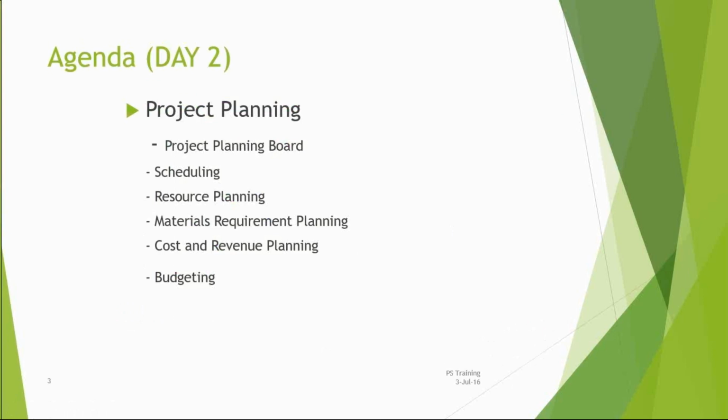Suppose my activity has so much of cost. This activity has 10 material components and it is being linked with three resources of so and so activity type, linked to this particular work center, and they have suppose 500 hours of duration. Then what is the remaining order value plan? This much. This is my commitments. This all comes under the cost. Ultimately, the cost will go and sit in the parent WBS.